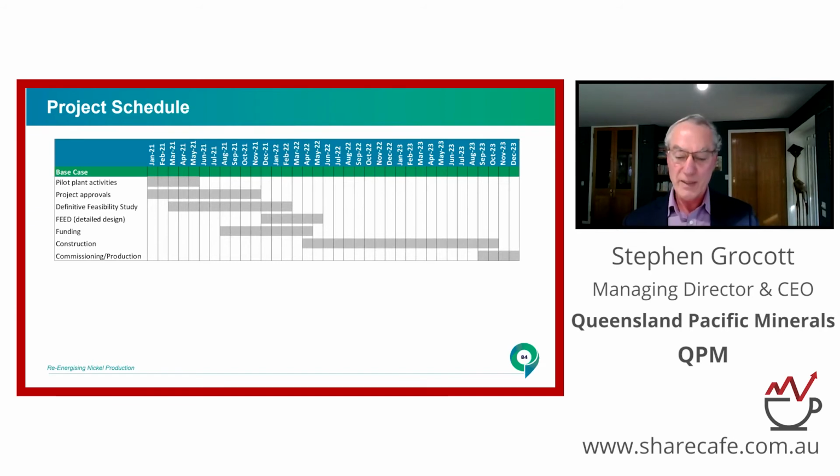We started a feasibility study with the Tier 1 engineering partner, Hatch, and that feasibility study will be complete early next year, and that will deliver a +10, -15% capital estimate. Now, we're fast tracking that feasibility study. As an investor, when you hear somebody say fast tracking, you should panic, because what normally happens is people cut corners, cut costs, and beat up their engineering partner who rolls over and plays dead. We're fast tracking by spending a lot more money on this feasibility study than a normal junior would spend. And we're doing that so that we can undertake activities that wouldn't normally be done in a feasibility study.